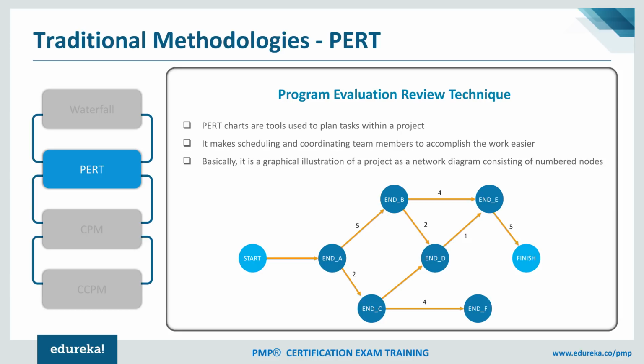And as you can see on the screen as well, we arrange these activities in a particular flow. And through this, we visualize the end-to-end flow of the activities by using the PERT technique. We would then also be able to work on some of the activities concurrently, and we would know which activities have dependencies. So all that was very useful in PERT to visualize it.